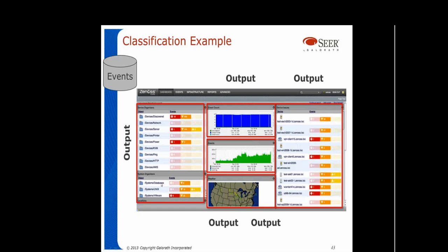The deal is that these are trivially repeated. They're outputs that needed to be developed once, but they're trivial instances of the same type of output, which is another rule in function point counting: you don't count things more than once. You count unique functionality.